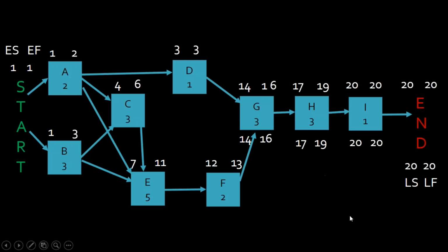G has to happen when it's scheduled to happen. And as you can see, that's a task that can't be moved, and there are two dependencies to it. So in the real world, I'm going to be really worried about these, making sure these get done, because I don't want to move G, especially with the domino effect on the rest of the schedule.